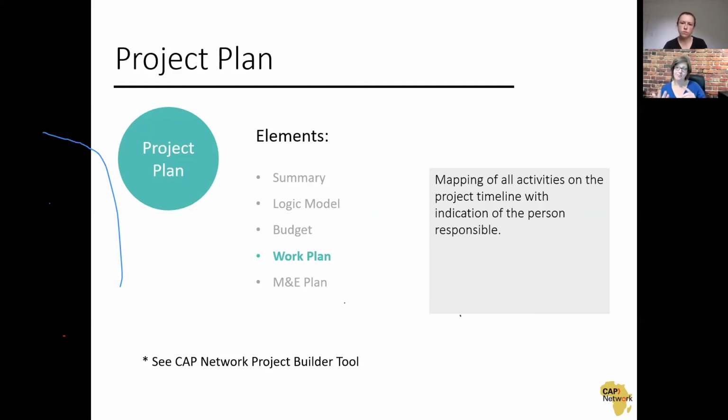It can also include costs. So if you are paying for an office rental, what you pay in rent already, and you're not including that in the project budget for the funder, you can include that as part of your cost share. These are things that you are paying for that need to be there for the project to be successful, and therefore really in the big picture are part of the costs of operating that project that you are already contributing as an organization, or that one of your partners is contributing, or that the community is contributing.